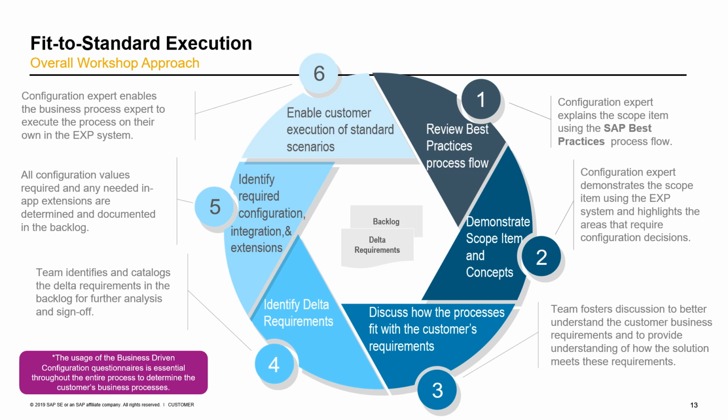The first step is to review the SAP best practice content and process flows. As the customers are first answering their business-driven configuration questionnaires, they can use the best practice content and process flows to get a better understanding of what is offered standard through SAP today.